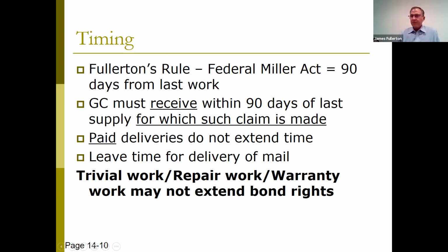And I would be fearful that a Virginia state court or a Maryland state court would make the same decision, because since the Miller Act and the Little Miller Act are so similar, the state courts tend to follow the federal case law unless you can show them there is a difference in how the statute is worded. They usually will follow the federal case law.